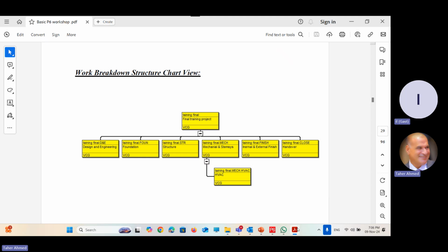Primavera, as I told you, has no... what you are going to do is completely true for Primavera. But I have to do my homework first outside of Primavera, draw a sketch representing the hierarchy of the work you are going to create by discipline, by type of work, by responsibility, by area, by zone, by functional, whatever technique I'm going to use. At the end of the day, the WBS represents a hierarchy, a breakdown structure.